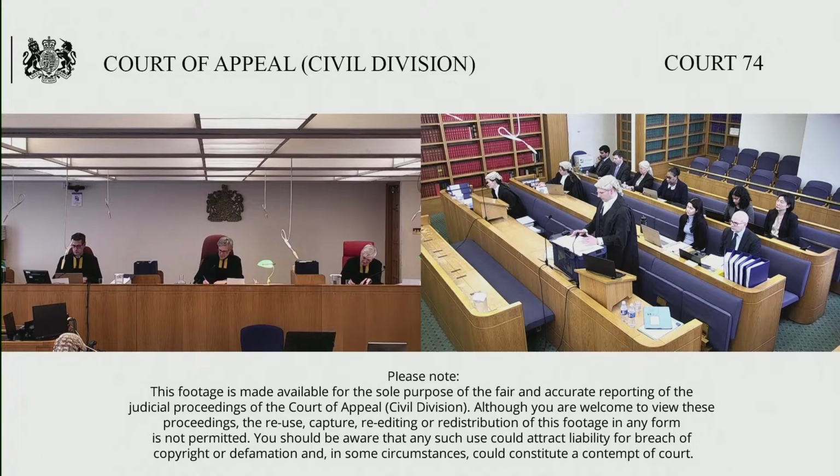What matters is the nature of the expenditure and the role that it plays in the provision. So the fact that some of the checks are done here in surveys many months before doesn't alter their nature. And of course, there is very good reason why they do the checks many months before. It's because it's no good finding out that there's an unexploded bomb at the site you'd like to drive the monopile into 10 minutes before you're due to hammer it into the ground.